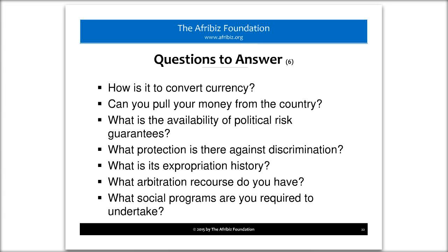Some of the clients that I've had in the past were purchasing things through the United States, and they were in Nigeria and they had plenty of cash, but they had to wait 2 or 3 days because their bank didn't have enough American dollars in reserve to make the wire transfer into the United States. So basically, you need to check those types of reserves in the country and see what their pattern is.